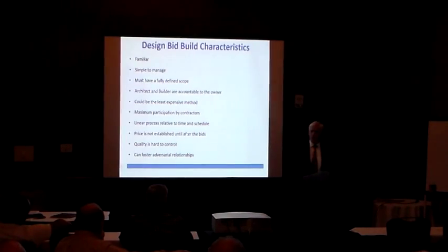Quality can be hard to control. If you put the thing out for bid and you let the world bid it, then you may get an unqualified contractor and you may get problems on your hands. If you have a selected group of contractors and you're comfortable with all of them, then that really isn't going to be an issue. But isn't the builder bringing his group of contractors to you?